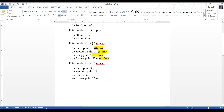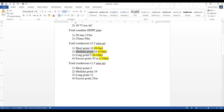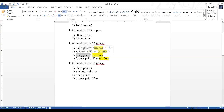For the 2.5mm² conductor, it is usually used between the sub-main distribution board (SMDB) and the switch box. If the wire length from SMDB to switch box is between 0 to 3 meters, we call it a short point. If it is between 3 to 6 meters, we call it a medium point. If it is between 6 to 10 meters, we call it a long point. And if it is above 10 meters, we call it an axis point.